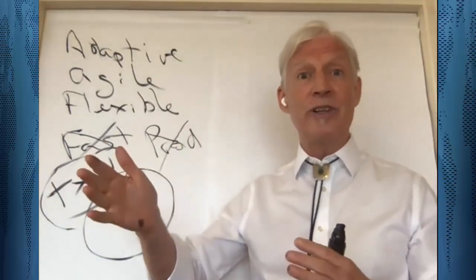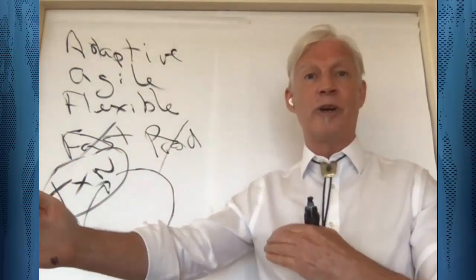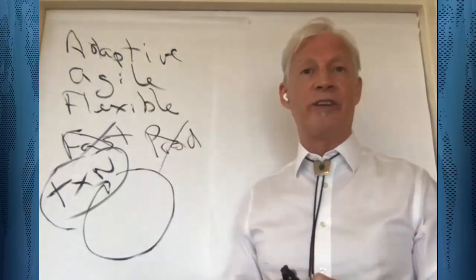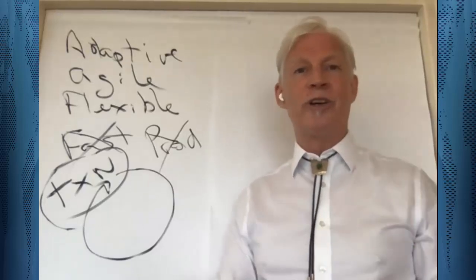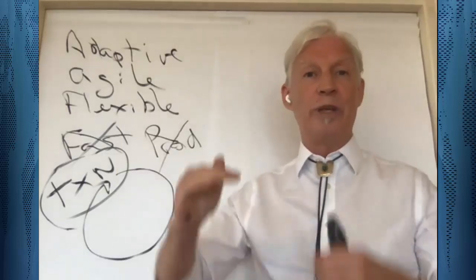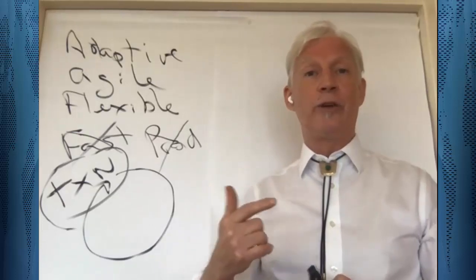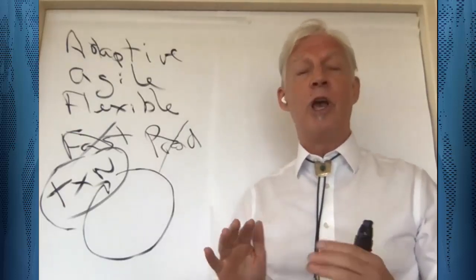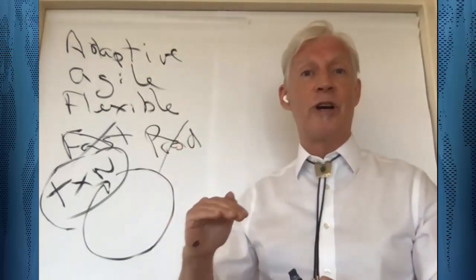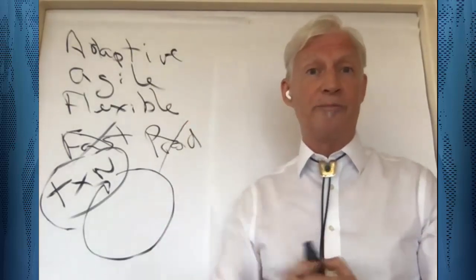And then I go to the accountant of the company and I say, hey, accountant, every time we want to do a delivery cycle of software, we add $50,000 of transaction costs for the manual testing. And then I ask the accountant, how many loops should we do a year, 20 or 1? Well, you can well imagine that the accountant is going to want to say 1, because they want to reduce their transaction costs. And so one of the key insights of the early days of the adaptive Agile movement was that we need to change the organizational design to drive down transaction costs as close to zero as possible. Otherwise, there's going to be a lot of friction in creating a loop-based system.